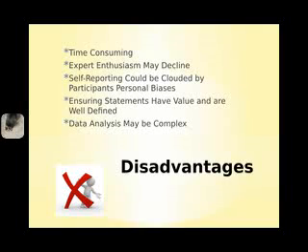Another disadvantage to using the tool is the self-reporting done by the experts. The personal experiences and biases of participants could cloud or influence their feedback. The tool can be made more difficult to utilize if questionnaire statements aren't well defined, because that may cause the expert feedback to have little value. Lastly, if there are a large number of participants, data analysis of all of the feedback could become immensely complex, taking time to analyze, which could delay the risk identification process.